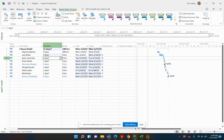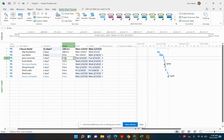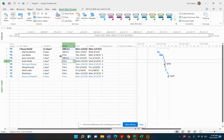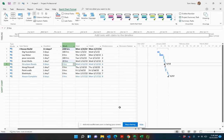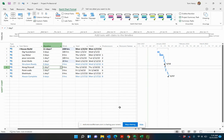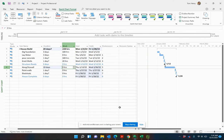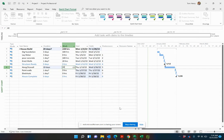Pour the concrete. That only takes a day, but it takes four or five different people to do it. We're going to say overall it's about 100 hours of effort across the team. Correct pools, just one day. But there's a crew of two to do that. So we'll call it 16 hours. Maybe a little bit more if they have extra time. Maybe we'll estimate it at 20 hours. Well, this is a milestone, zero day duration, zero hours of work. And the drywall, let's say that's going to take 10 days and it's going to take 40 hours.